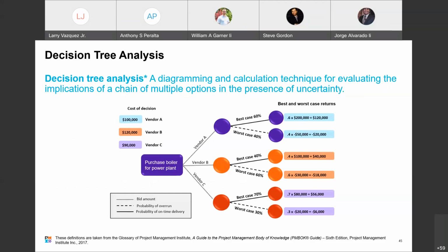Decision trees allow decision makers to evaluate both the probability and impact of each branch of every decision under consideration, making it a useful tool for risk analysis. Solving the decision tree indicates a decision that will provide the greatest expected value when all the uncertain implications, costs, rewards, and subsequent decisions are quantified.